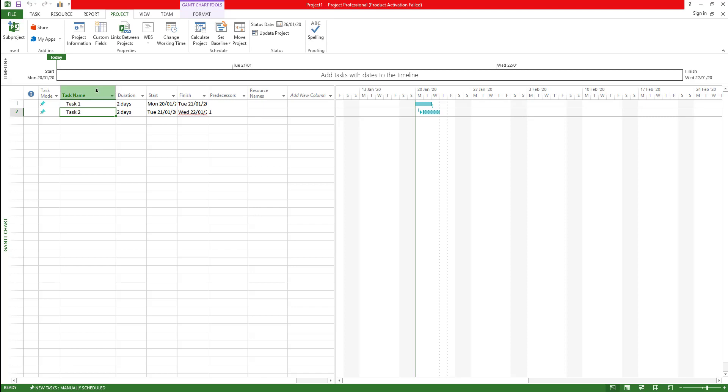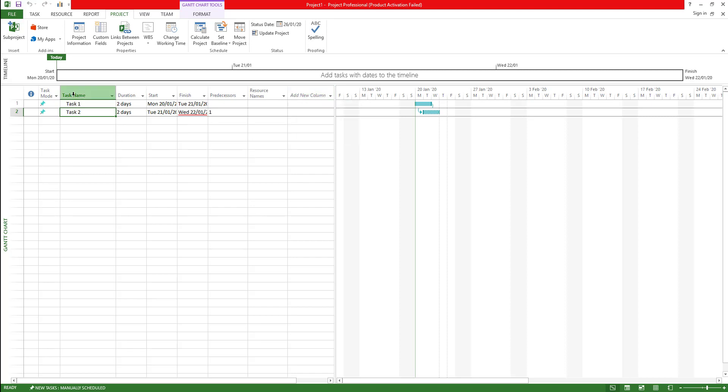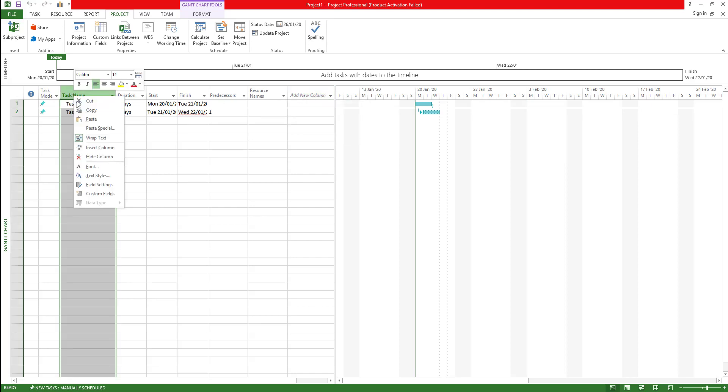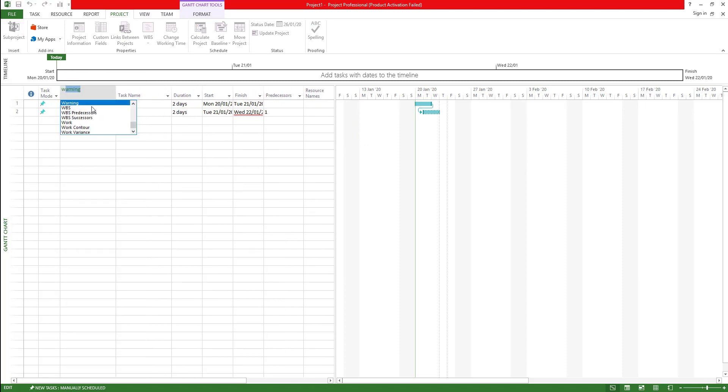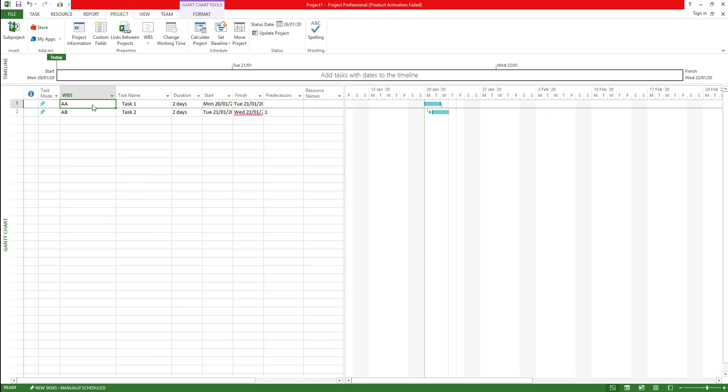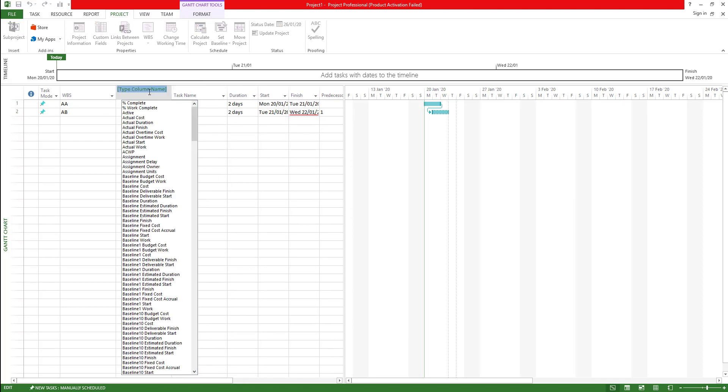Where is the WBS code? Now I'm going to insert a new column. As you can see this is sort of like Excel, so there is an option to add column right up here or you can right click and then insert column, and then you can say WBS. Then it creates a WBS column.